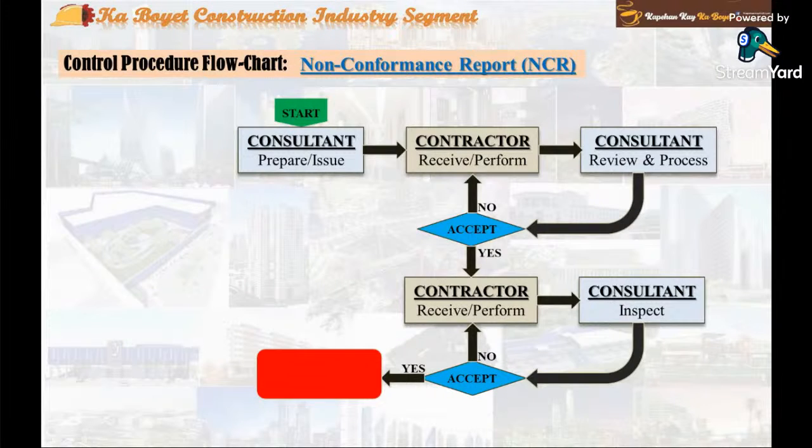Note, no installation with an open NCR shall be paid by the owner until the open NCR is officially closed. However, the project architect or the owner has the final decision whether any installation with an open NCR can be paid or not.